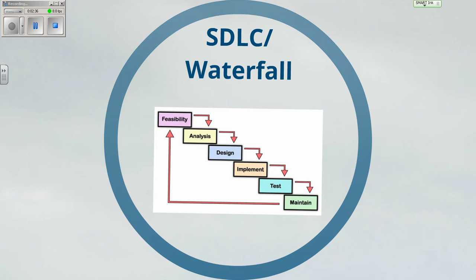The logic behind the proper formal implementation of the waterfall model is you don't move on to the next one until you finish the previous one. The whole point of the waterfall is that waterfall falls, it doesn't flow up. You're not supposed to go back. Though, in theory, you can go back, but you have to negotiate quite strongly with your project manager. And it might be that you agreed at some point that you can go back, though the system wasn't designed for you to go back.